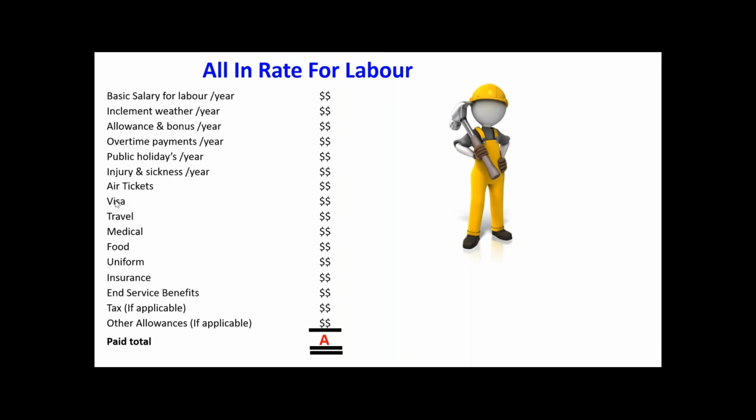Okay. There was another question. As we are including the insurance in prelim, why should we consider it under labor rate? Can you please explain? Two ways. If your insurance cost is covered under prelim, you don't do double counting. Otherwise, if it is counted here, don't do double counting there. Either in one place, you have to keep the price. Somewhere the cost is covered, you don't need to do it twice.